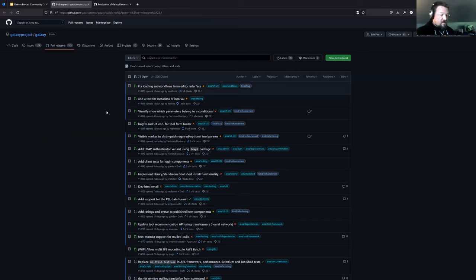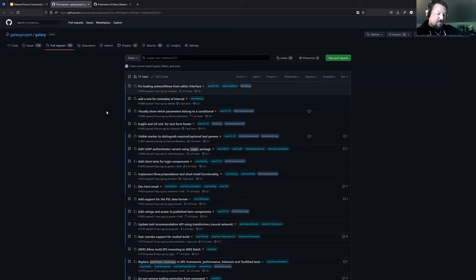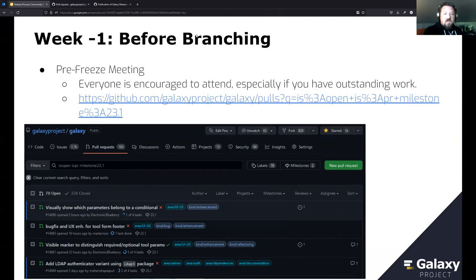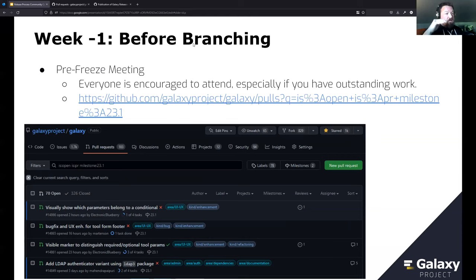The idea behind the freeze is that it's a feature freeze — no new features go into that branch at that point — giving sufficient time to test what's in the branch and get it to people in a well-tested form without rushing in new features at the last minute. Everyone is encouraged to attend; we just pull up the list and walk through every single issue, asking: is this critical to the release, are we going to get it in, who's going to do it?